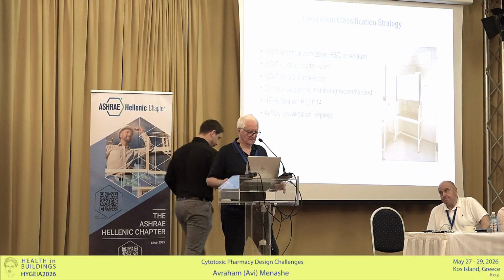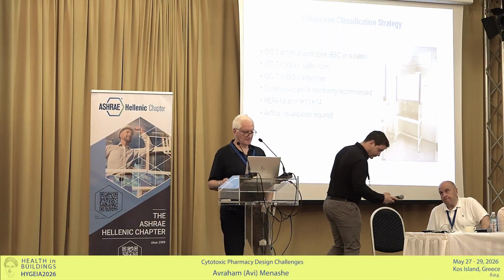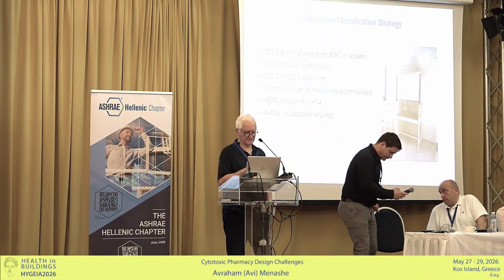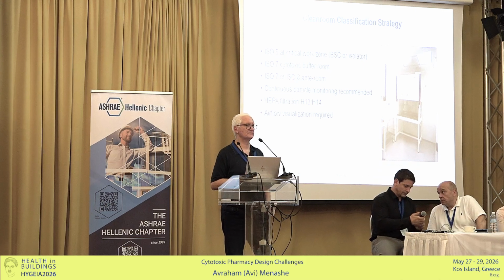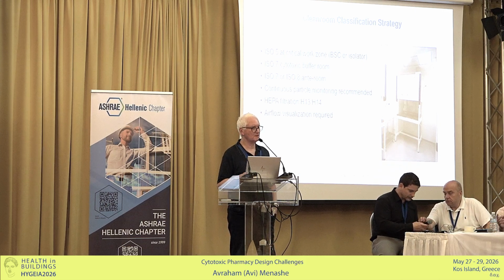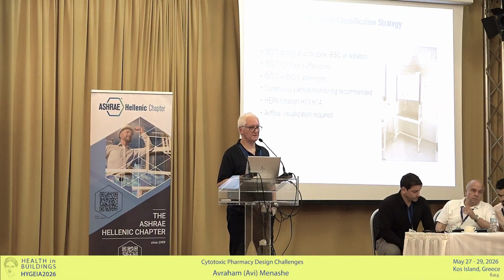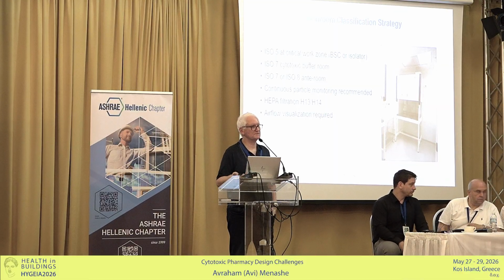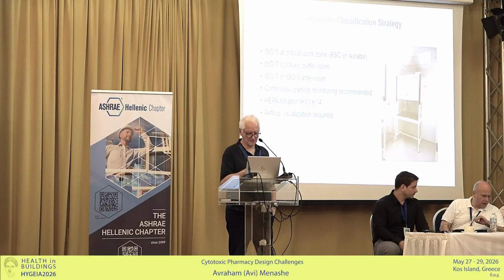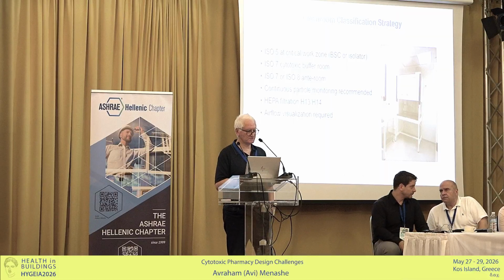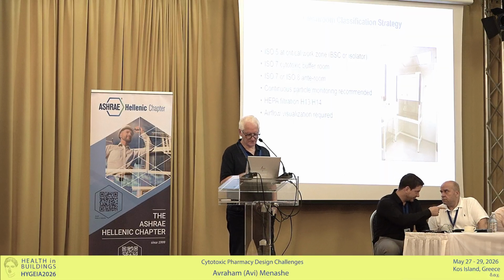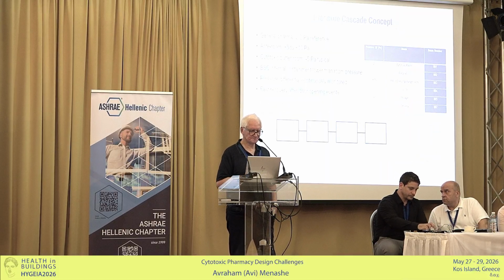So, very interesting things and a lot of investment in such a kind of small facility. Normally we are talking about 12,000 euro per square meter in such a kind of facility, because at 50 or 100 square meters you can make the calculation of how much such a facility costs you. The airflow visualization is also required. And then comes the pressure cascade.